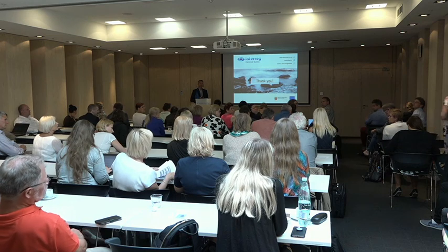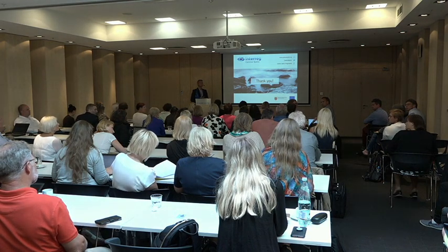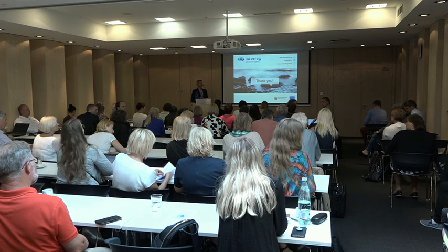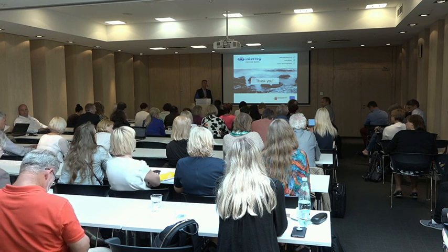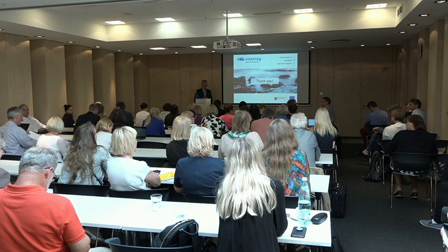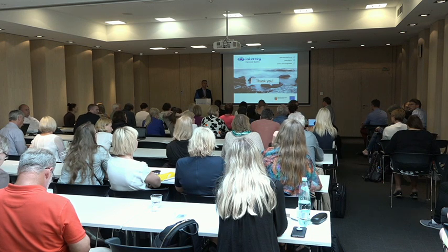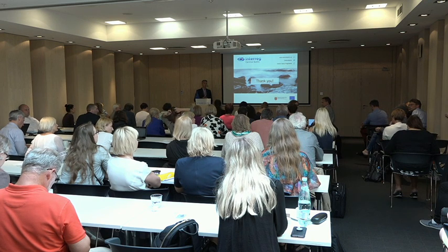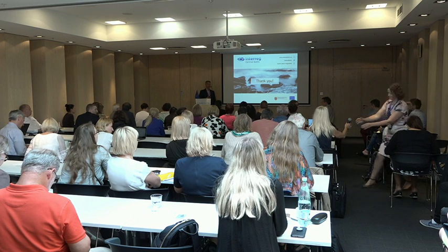Hello, I am from Riga Technical University. I have a question. How often can we change those fixed salary percentages? Can we change them for every month? Because we have also those structural funds where we have to report on the vacation payments specifically for each project, and we cannot report a percentage. So during the vacation periods, payments for Central Baltic project would be sometimes less, sometimes more than the percentage we would try to fix. Yes, we don't allow constantly changing this share. So I don't think we have any straightforward rule on that, but I would say a few times during the project duration you can make such a change.